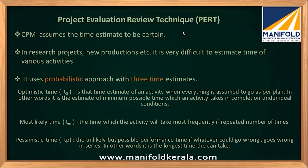In PERT, they use three time estimates for calculating the expected time for each activity. Once you calculate the expected time, the rest is similar to CPM — you continue with the other steps involved in CPM. The three time estimates are: optimistic time, most likely time, and pessimistic time.